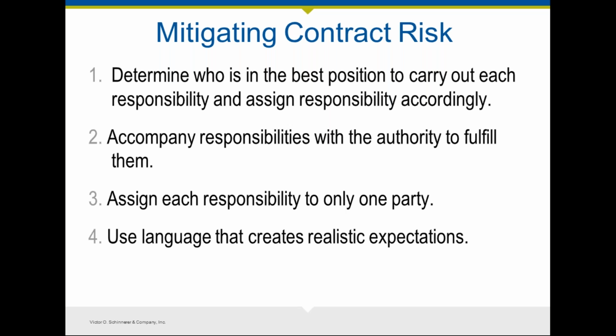Contracts are a way in which you can help manage the risk between you and your client. Remember that 2/3 of all claims in our program come from your clients. Similarly, the amount of money that is spent in our program in terms of indemnity, most of that goes to the client.